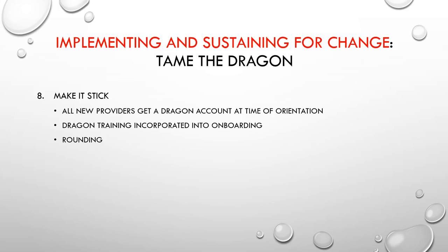So, all right, and then last, we made it stick. So we added it to the onboarding for every provider that comes on the institution. Everyone has to have a Dragon account. As soon as they get EHR access, they get a Dragon account. We make them log in. We make them set up their accounts. That way we could troubleshoot any issues up front. And because we do that now, it's just the thing, right? It's just like getting a mouse. When you walk up to a computer, you have Dragon. We also round on all the units regularly, so we go around, and it's extremely time consuming, but we ask them, like, what issues are you having? What can we help fix? And that keeps it on everyone's forefront.